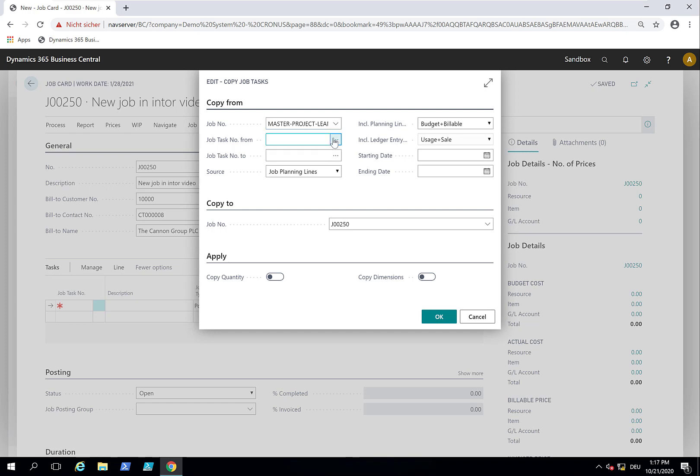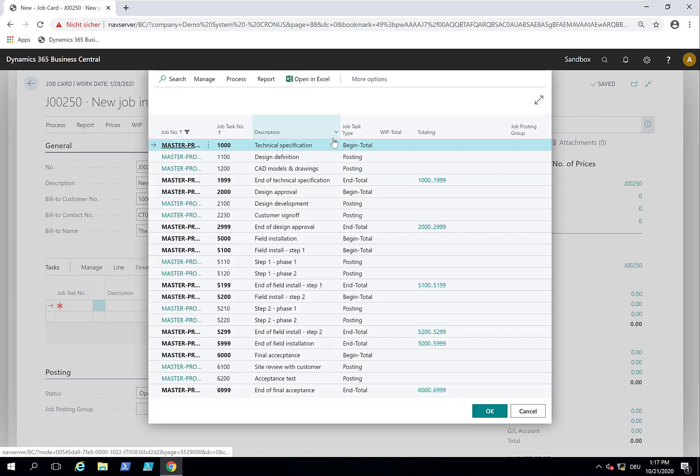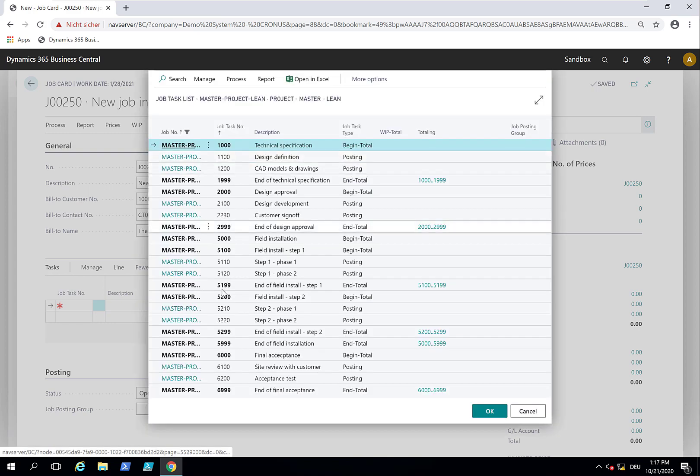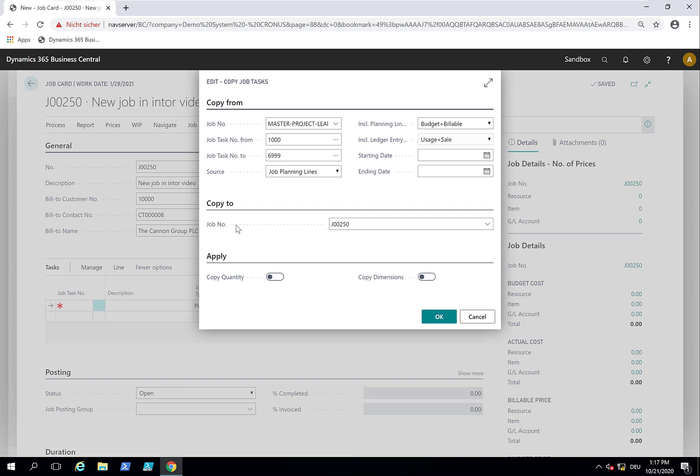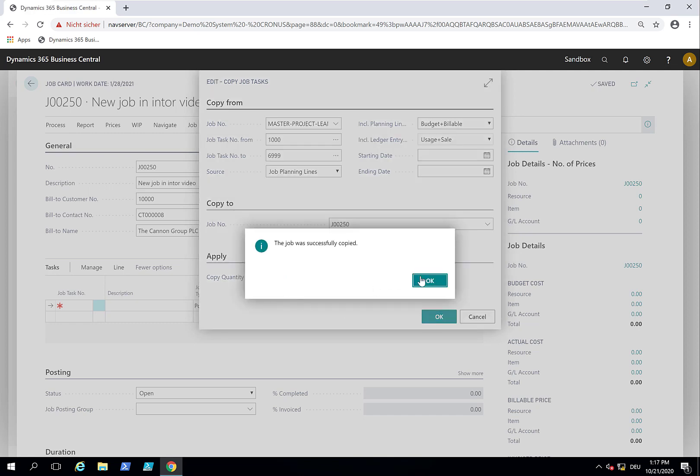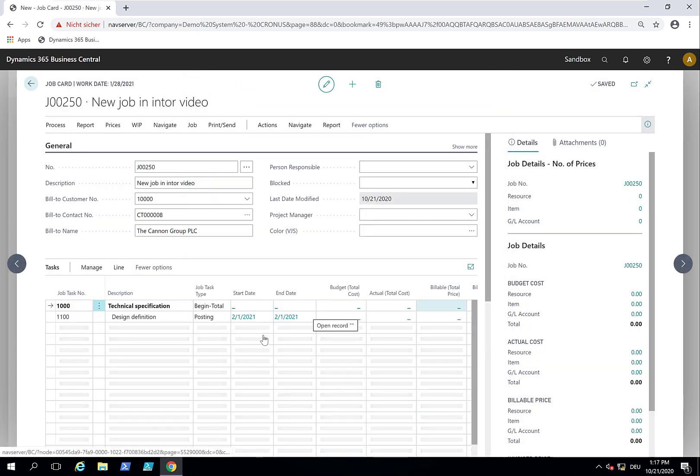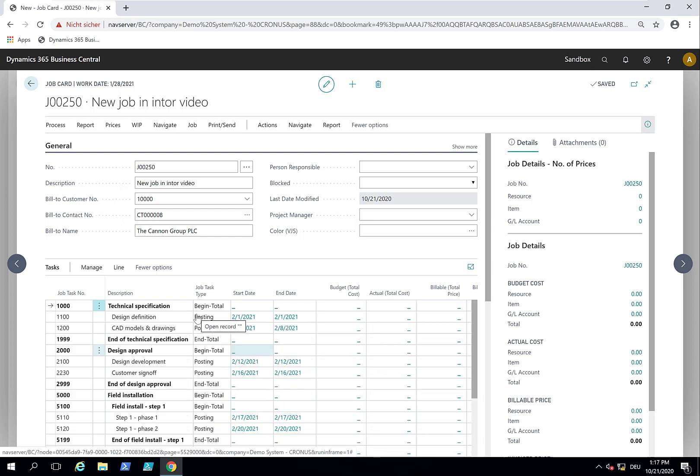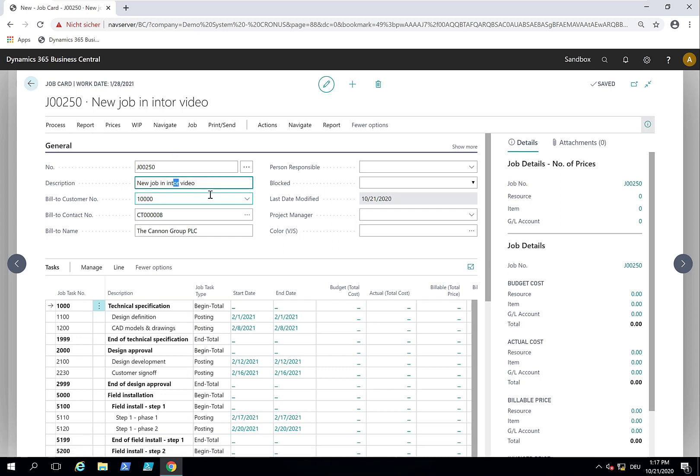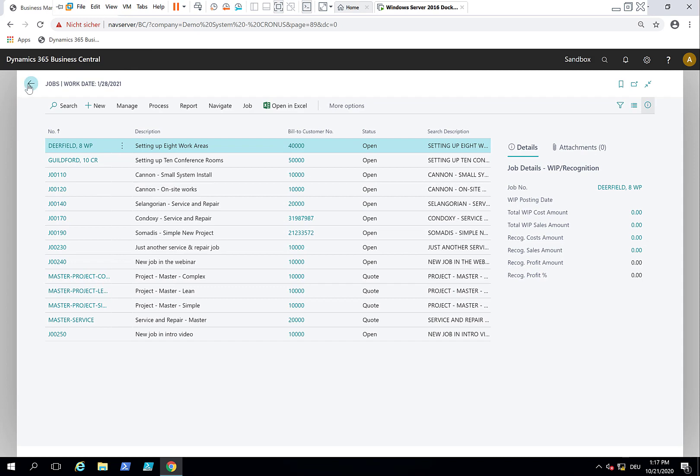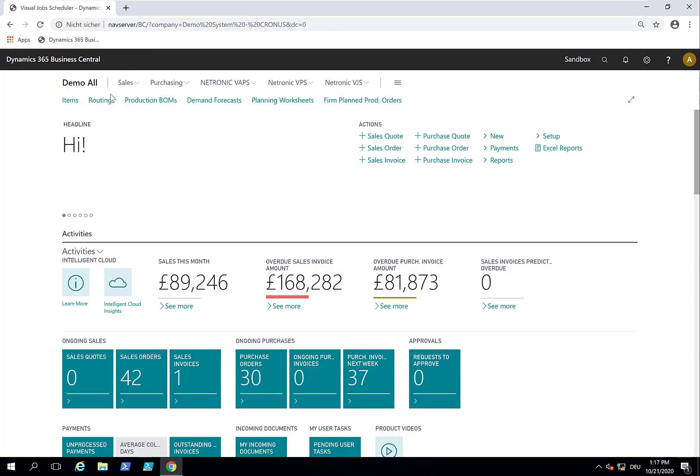I take the first to the last task so that we copy the entire project. You can also copy just parts of the job, but I want to copy everything. I copy the quantity, and now my job planning lines automatically get populated. This is Business Central functionality. Now I have created a new job, job 250, 'new in intro video.' We want to schedule it from the Visual Job Scheduler.